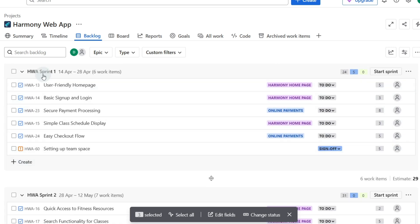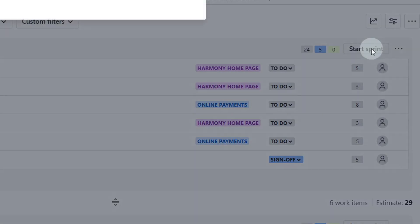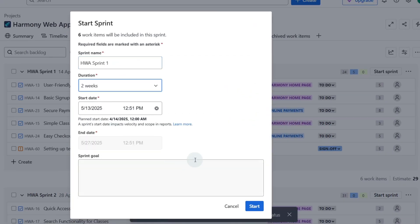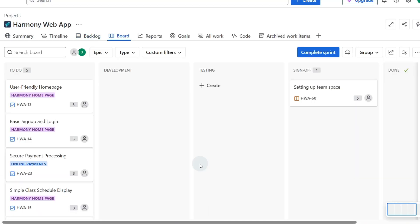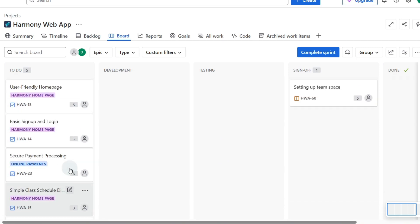So what we're going to do now is start the first sprint and if we just go up to the top we've got our sprint one. Let's click on start sprint. We just check that everything is correct. We can add our sprint goal, what we want to complete during the sprint, and then click start. Now that's going to put all of these cards that we have that we put in our backlog onto our kanban board.